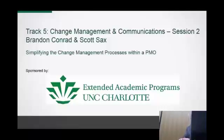So who's in our meeting? So we have our directors and our PMO. Our PMO consists of myself, our assistant director, and then we also have a part-time project manager / trainer. And then we have our directors, our CIO, and then anybody else that the directors wanted to bring in. So they might have known a change was coming in. They wanted to bring that project manager from their field. So this constitutes a forum for the meeting. If one of those key groups isn't represented, the meeting is pushed.